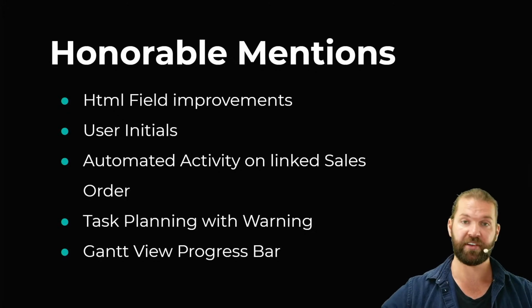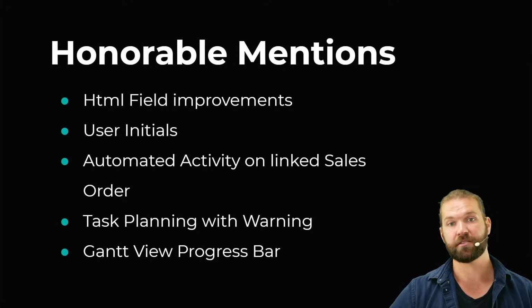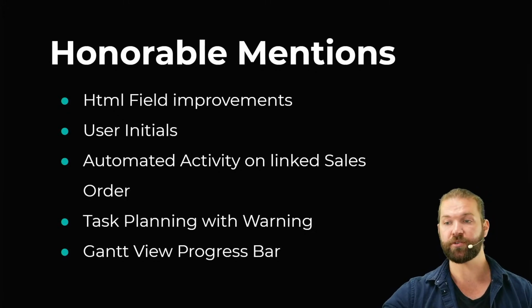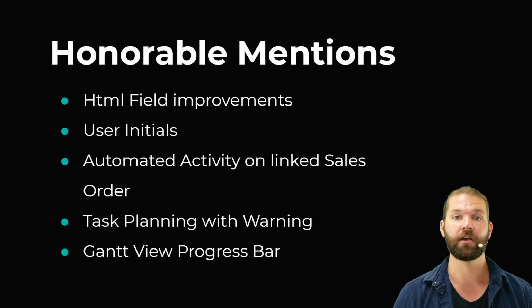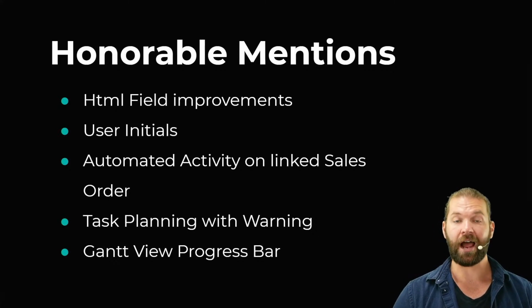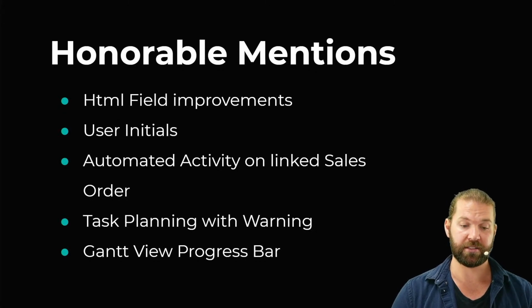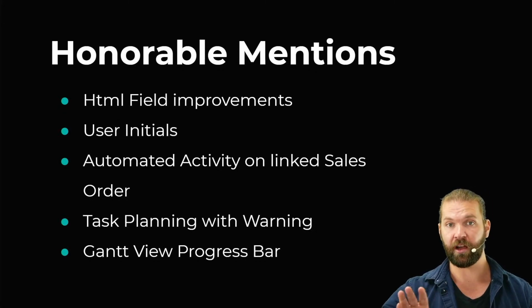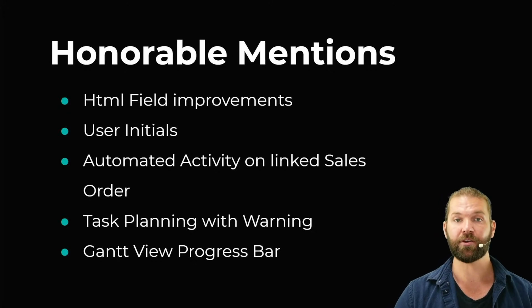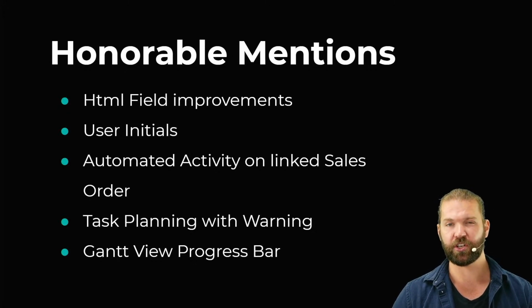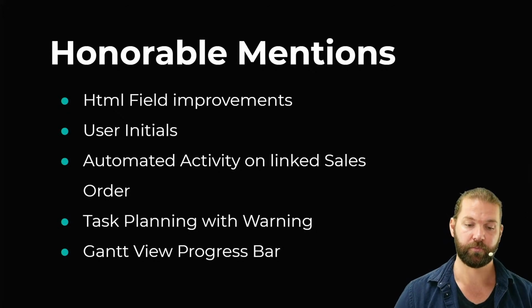So if you have, say, 50 hours on this task, and it's in the Gantt view, you see what's going on, who needs to be assigned, and when it'll be worked on. And the thing is, there are hours assigned to it. So how many hours are available and left? Now there's going to be a progress bar clearly visible on it to see how many hours are left and how many have been consumed. So you have a good idea of, okay, I need to be more sensitive to the time available.